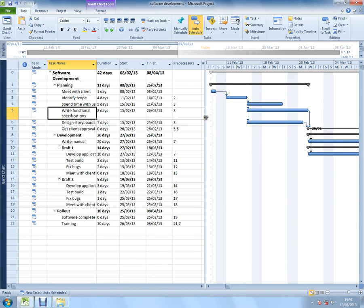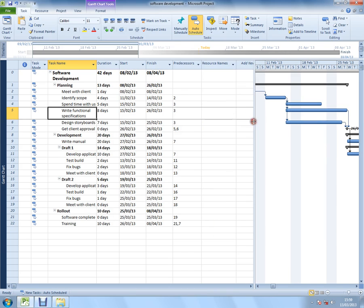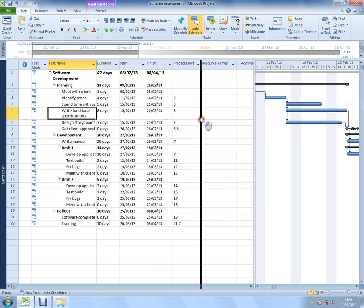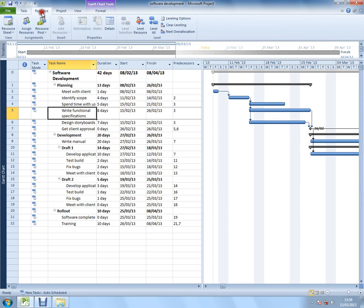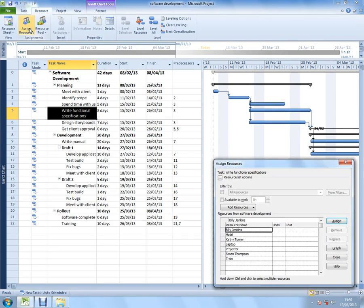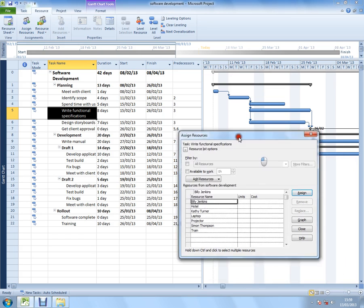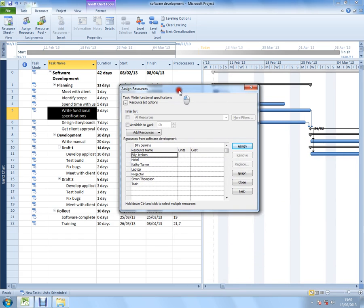The last column of the entry table in a Gantt chart here is a nice quick way of assigning. But arguably the best way, the most effective way, is to go to the resource tab up on the ribbon and into the assign resources dialog box. You've got much more capability here, many more options, much more power.